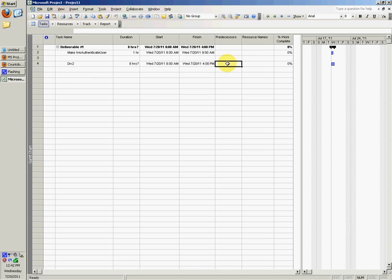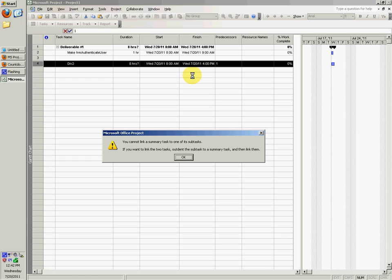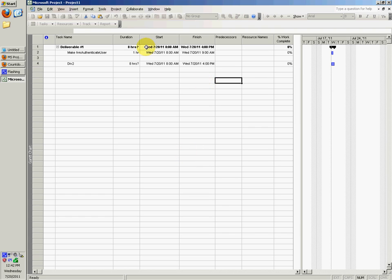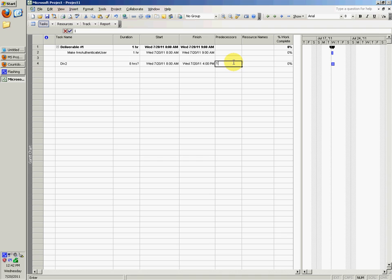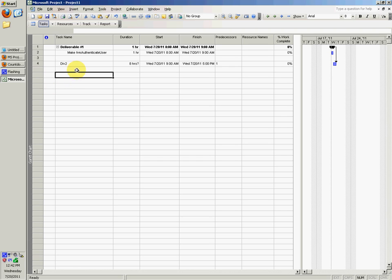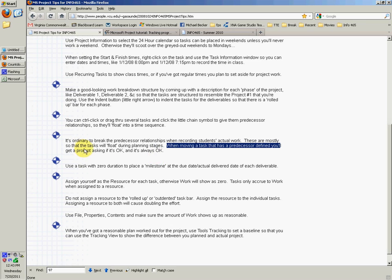You can control-click or drag through several tasks and click the little chain symbol to give them predecessor relationships so they'll float in a time sequence. For div two, you want to do div one before you do div two, right? So you could do what he said there, or you could just type in one. Now div two requires that you first do div one, which makes sense. You first want to turn in div one and get that complete before you start div two. Or you can do it the way he did it with the control click.